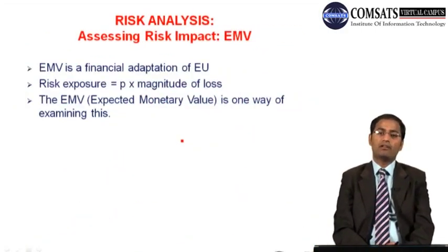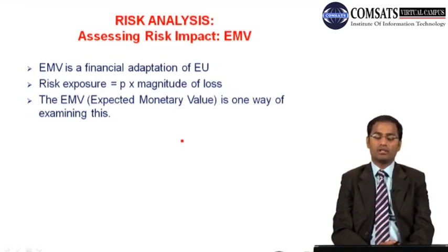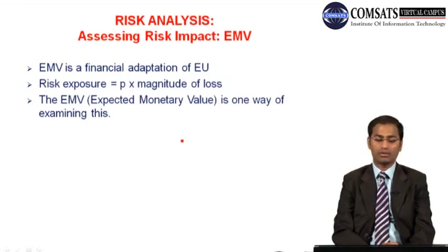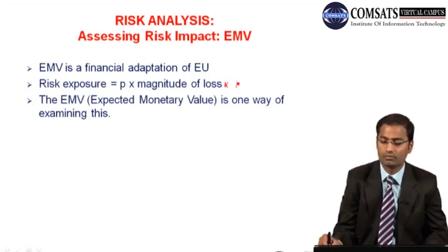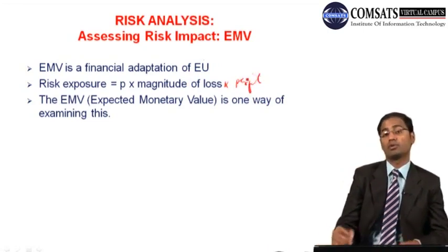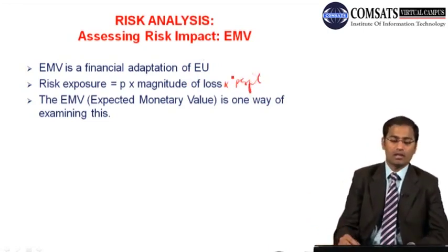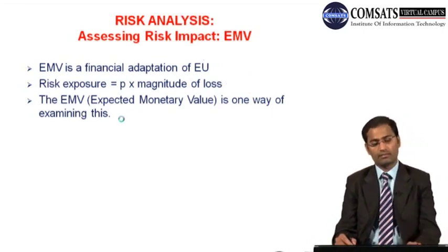So through that example, we have reached the conclusion, and we just want to remember one thing: expected monetary value is a financial adaptation of expected utility. Risk exposure is probability times magnitude of loss or profit, as risk is both opportunity and threat. And expected monetary value is one way of examining this.